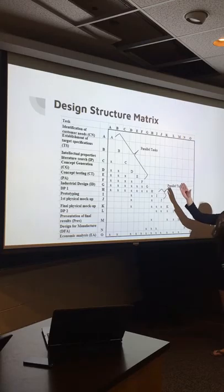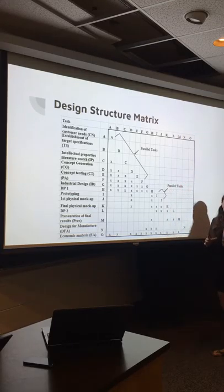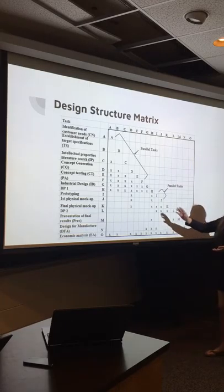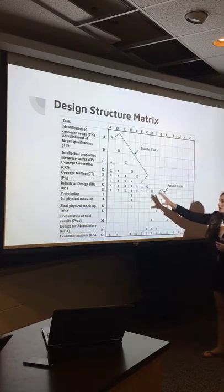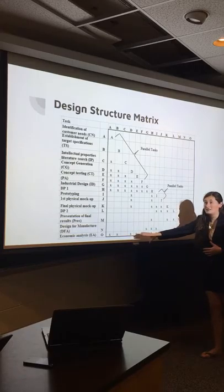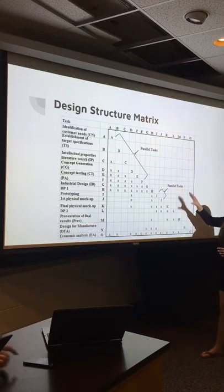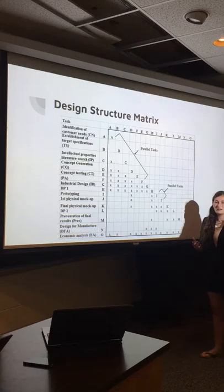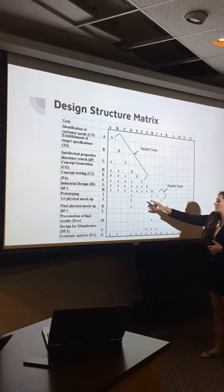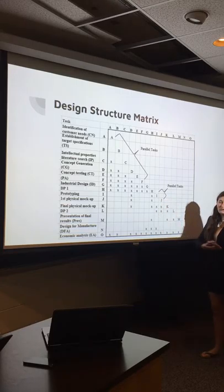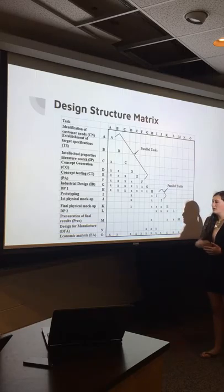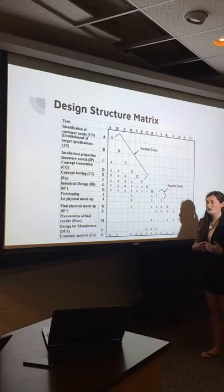For the design structure matrix, it's basically a chart that shows the different relations between the different tasks in our Gantt chart. The relations are shown by the X's marked in the chart. As you can see, the economic analysis is related to most every single task, because our team always wants to consider economic factors with whatever we do. Also, our prototyping and first physical mockup is an example of two tasks that we put in parallel, because they were so closely related that we could do them simultaneously.